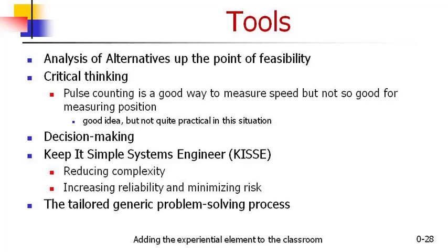The books talk about building a table or a decision tree. But wait a minute. If you're only going to make the decision once and you get a weighting that says the other options are not going to happen, there is no need to build the unused parts in the decision tree. Don't waste the time doing it. The only time you do use a decision tree is when the decision is going to change under different circumstances and the weighting is going to change. But the books in general don't point that out.